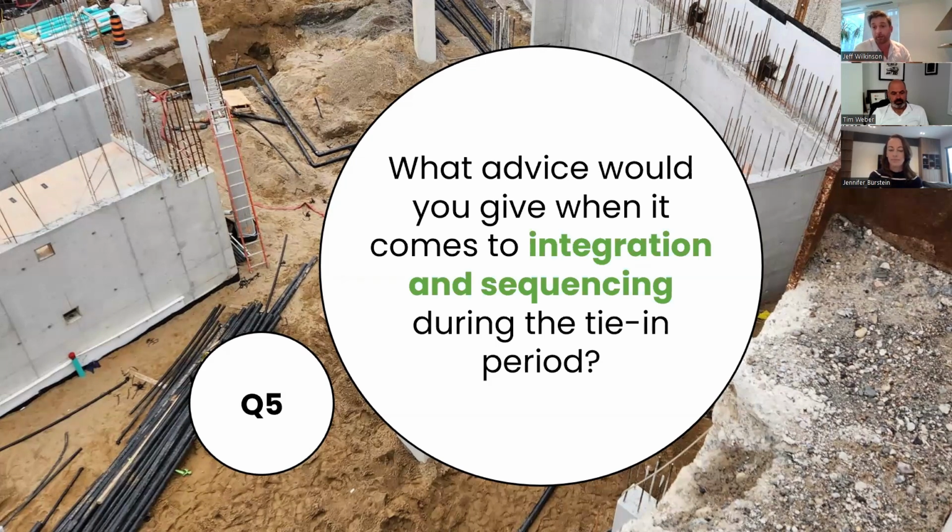And again, at Manderley we didn't have a lot of space, so you're having to run your laterals pretty close. So I would say the whole team has to understand elevations very carefully: the architect, the structural engineer, and the mechanical engineer for the under slab services. So I think that needs a lot of attention with that type of foundation. Yeah, and it's interesting you say that.